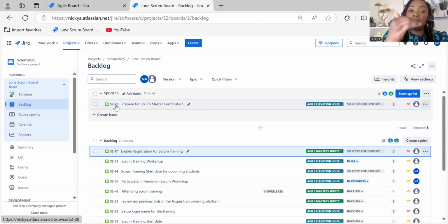of course, we want to review each user story one by one to make sure that our team members understand the detail, right? We want to make sure they understand the descriptions really well, they understand the acceptance criteria really well, the story has been estimated, and they're ready to start the work, right? We want to make sure that our user story meets our definition of ready. So once our team member accepts the story and we start the sprint, we want to make sure that they are going to be able to complete this story as they accept it. They're going to be able to deliver it.